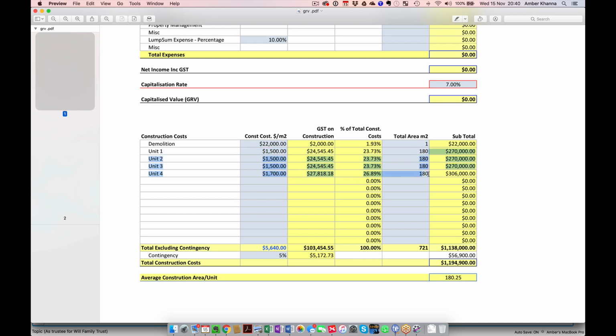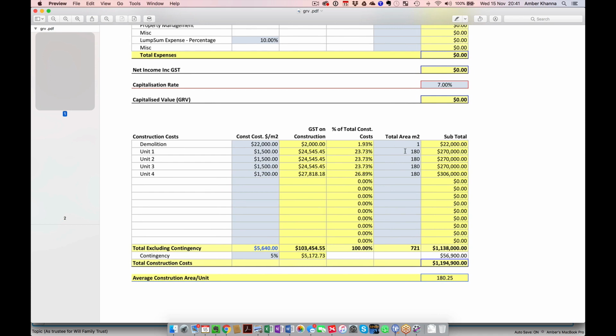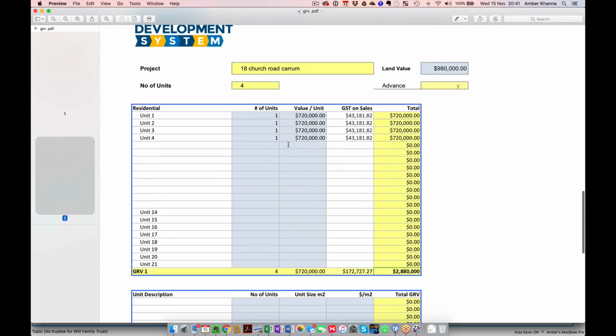And when you see an architect, it may cost you $500-600, but it'll be a good exercise of what they say, and they can give you some schematics. Based on those schematics, you can actually do your numbers properly. Because I think at the moment 180 as an area for a 3-bedder is too large. A 3-bedder is usually no more than 150, 160. 4-bedder is 180. Right. And your price here 1500, you got to push it up to at least 1600 or 1700 at least.